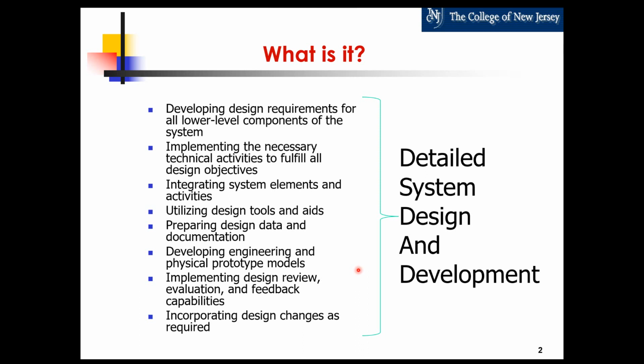philosophy, activities, one of the main objectives is to pull changes forward, making sure that any changes happen as early as possible in the overall life cycle of the product, because as a rule of thumb, if you normalize the cost of changes to one at some point in time and at some phase of the overall life cycle, if a change happens in subsequent phases or parts of the life cycle, as you go through those, each change is going to cost 10 times more.